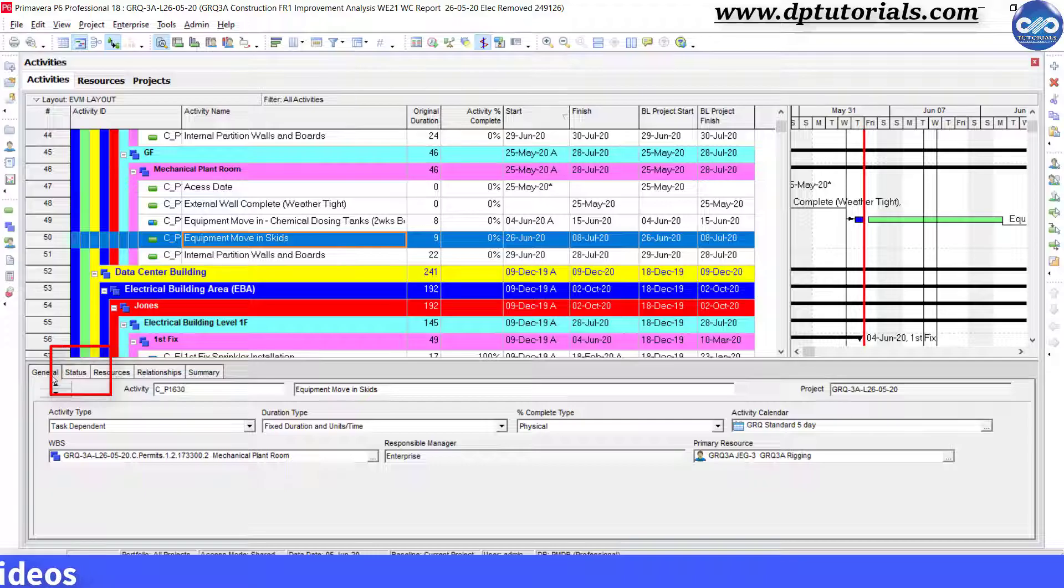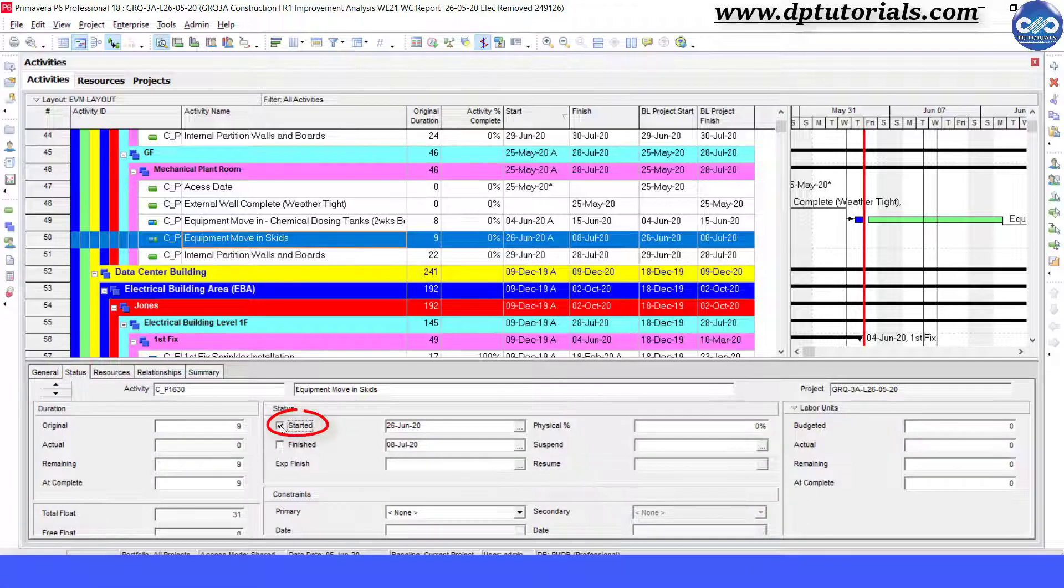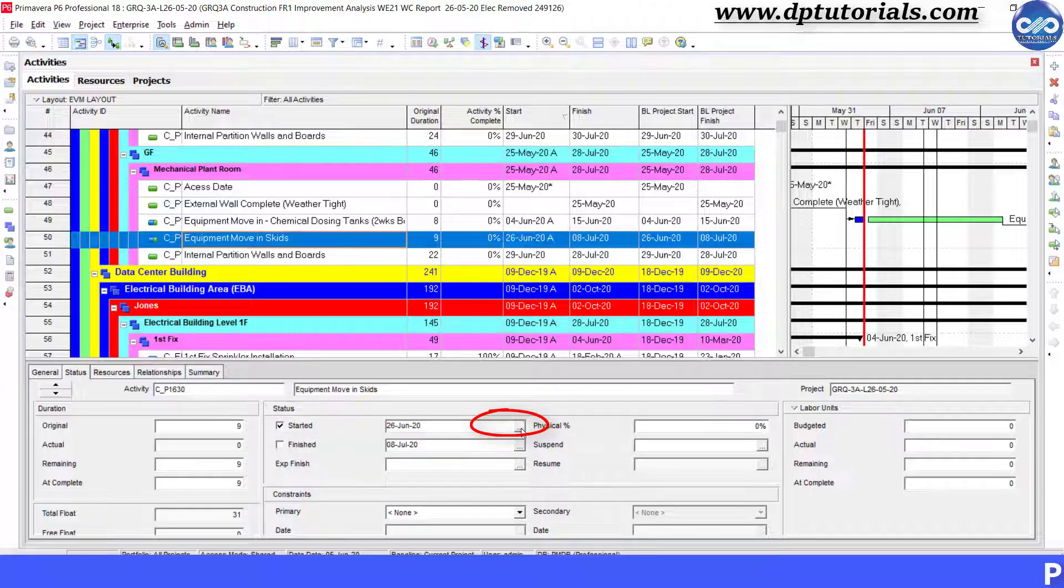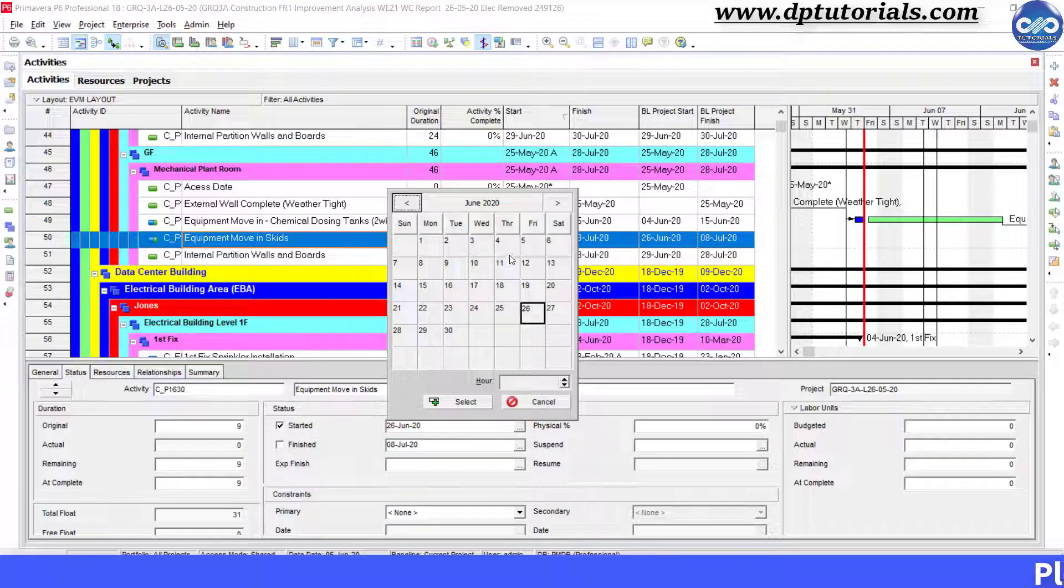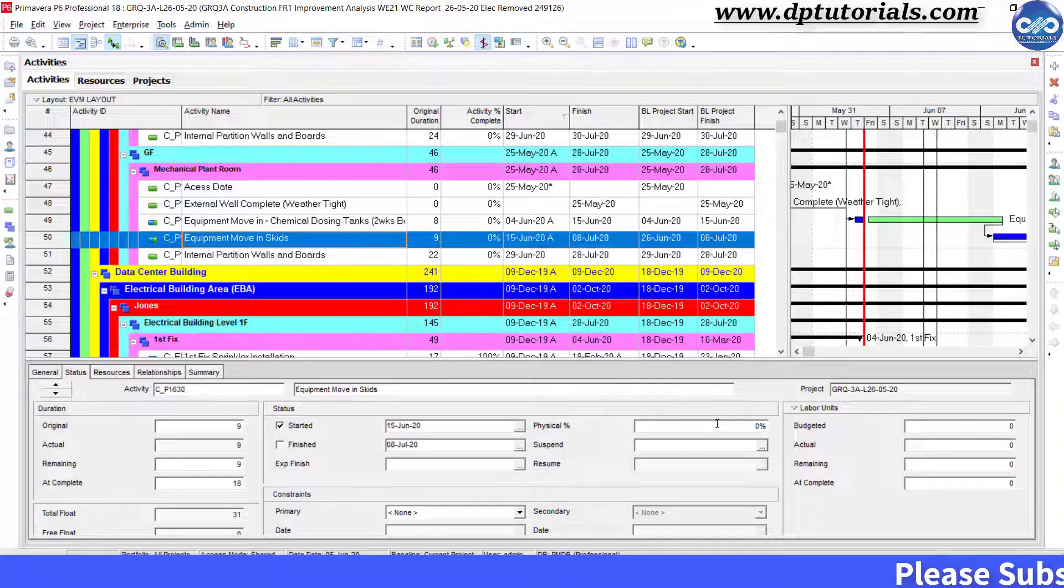Go to details, go to status tab, and check the start checkbox here. Enter the date as 15th June 2020, and you can also enter the percentage of progress.